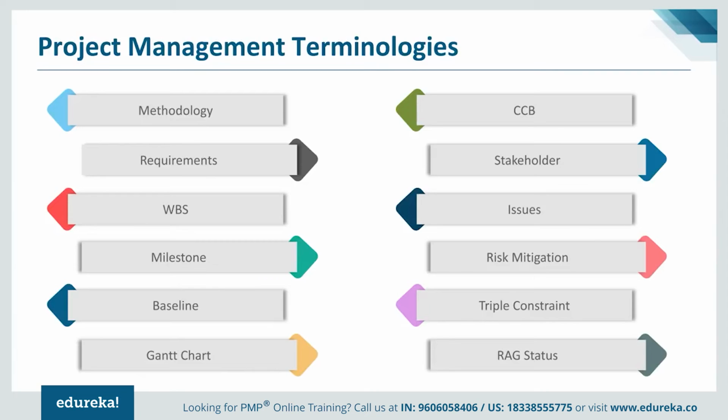Mitigation actually helps in reducing the impact of that risk. So as I mentioned, you're working on a new requirement and you're not very confident about it. One of the mitigation strategies you decided on was to increase the test coverage, or do more tests. If that is the mitigation plan you have decided, then obviously you need to implement that plan accordingly so that you can mitigate that risk. Otherwise, what will happen? Once you put that feature into production, and if it doesn't work properly, you will have a lot of production issues. So you'll have to ensure that you mitigate risk properly.